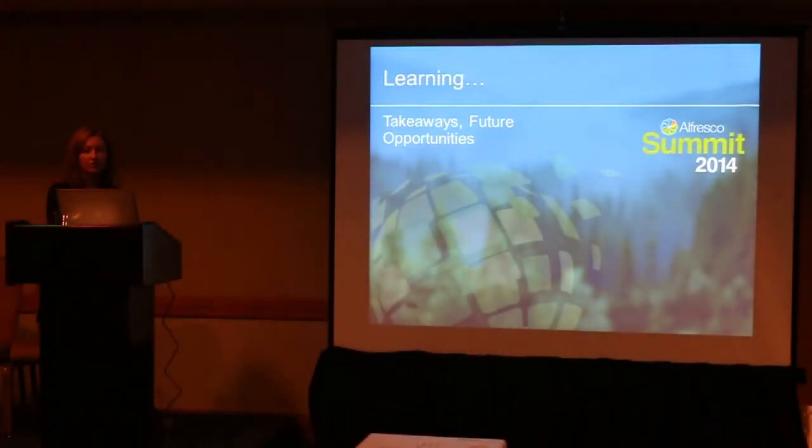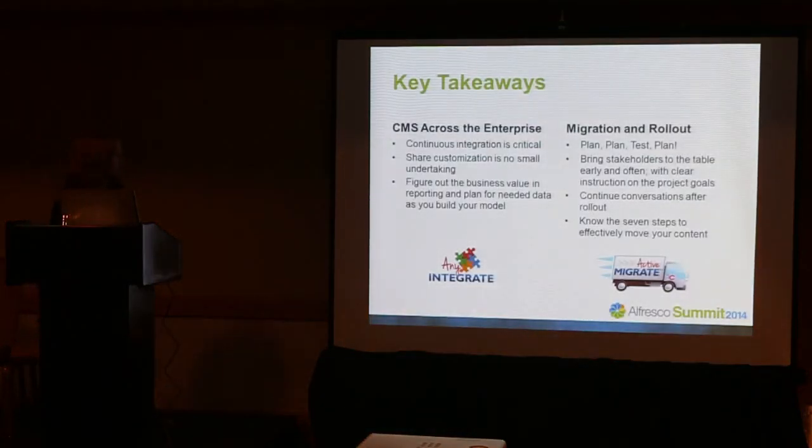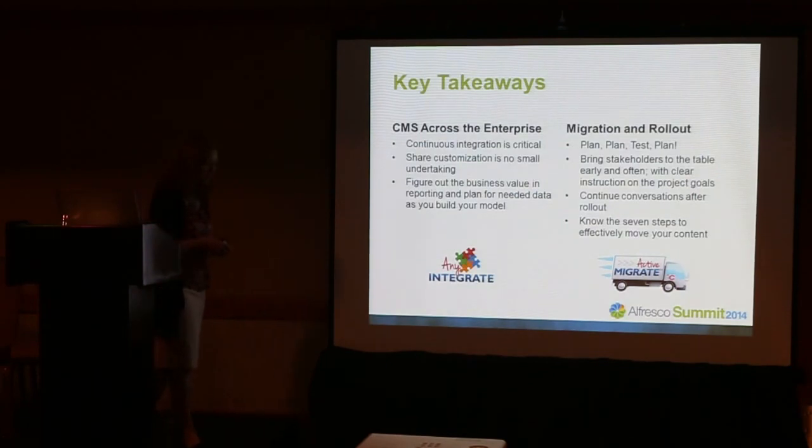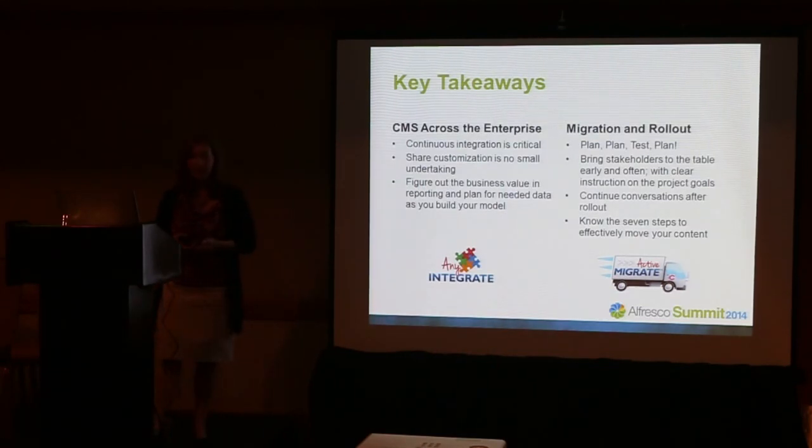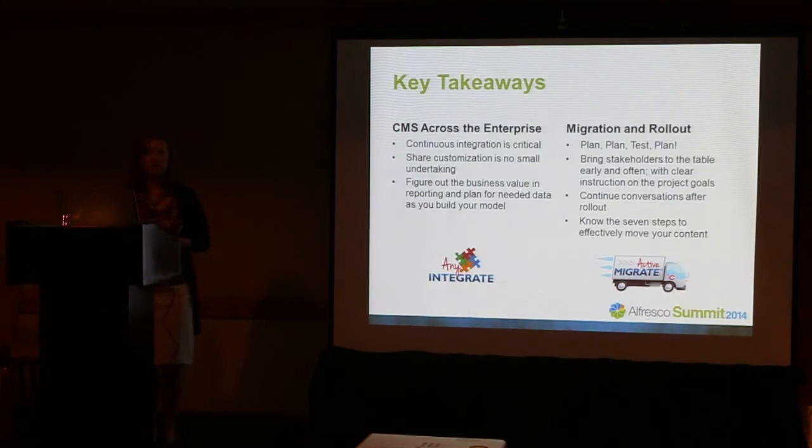So, some takeaways from this. I think the ideas around continuous integration that I talked about, understanding how to architect your code for Alfresco, is critical. You can't be agile if you don't know how to deploy your code quickly and consistently. So that continuous integration was really critical for this project. In fact, we spent extra time in the beginning, and Vito was like, so when am I going to see something? And we were saying, hey, we're still building the foundation, but you're going to like it because in the future, when we add functionality, it'll be easier to deploy.